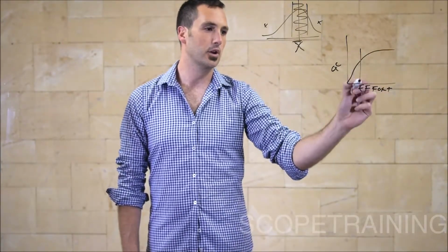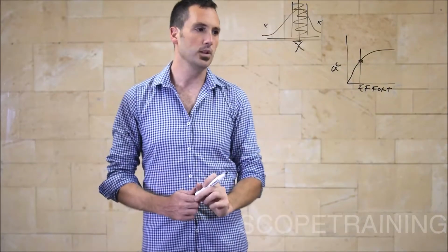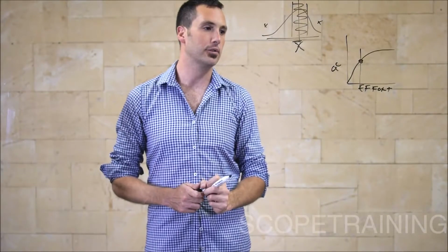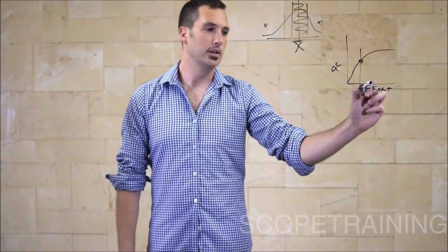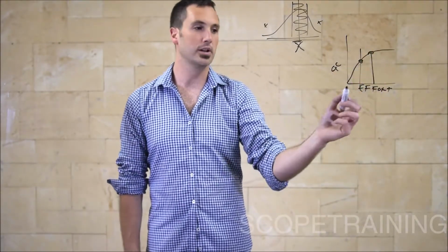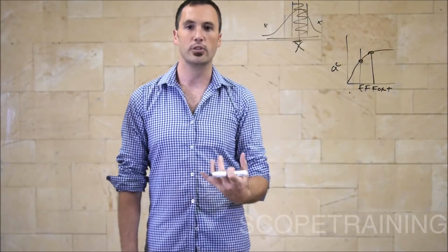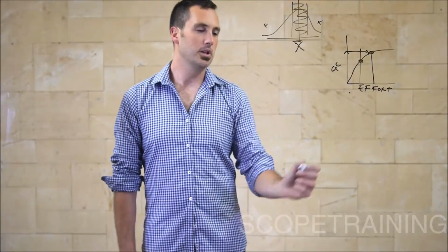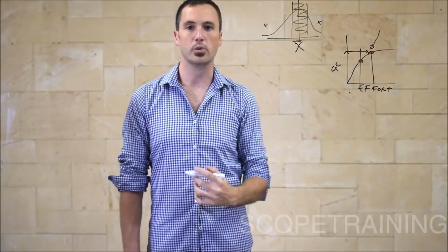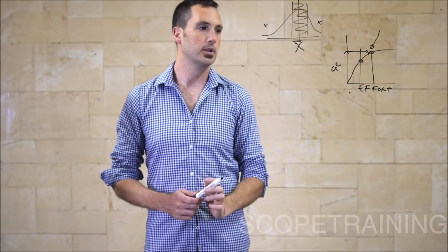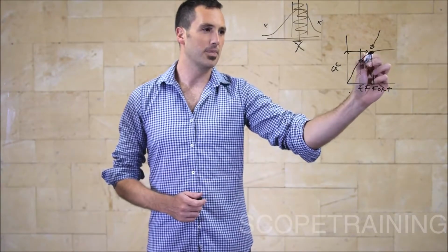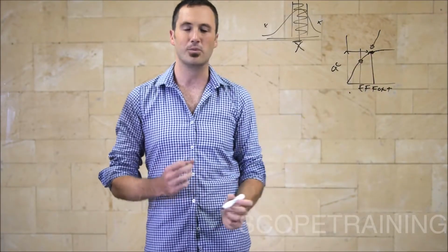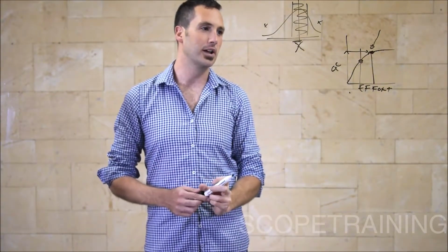Okay. So very early on in the project, you probably won't get a strong estimate because it's concept, you're only putting a few hours into it just to get a rough number. As you go through, have a detailed work breakdown structure, more effort has gone into the development of that estimate, so the accuracy is greater. There becomes a point where, in economics we call this the law of diminishing returns, you start putting more and more and more effort in, but it's only an incremental, marginal, if that, increase in accuracy.